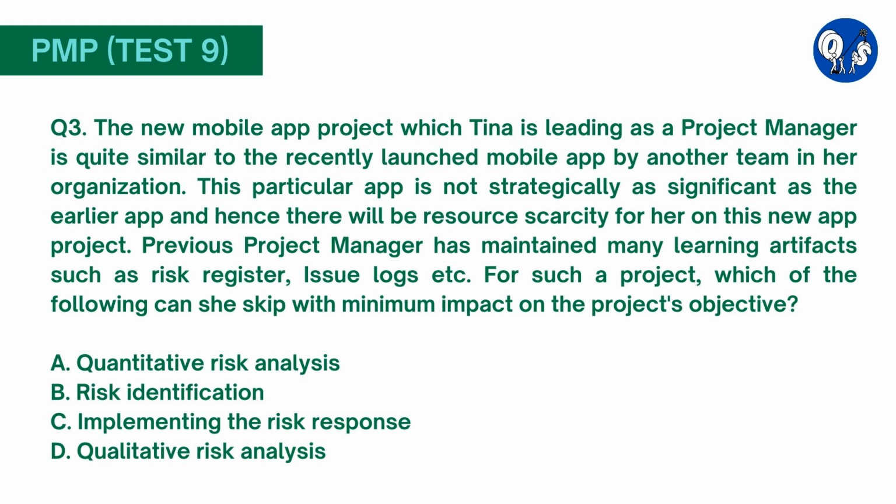Usually, quantitative risk management requires extra time and cost and is typically done for large and complex projects that are strategically significant for the performing organization. In the above case, the project manager is constrained by resources and she also knows that this project is not as strategically significant as the earlier app one. Therefore, she can skip the quantitative risk analysis step with minimal impact since she can obtain such data from the project management office from the previous project.